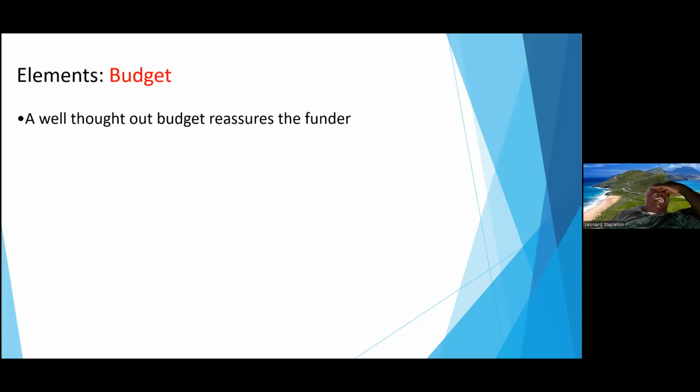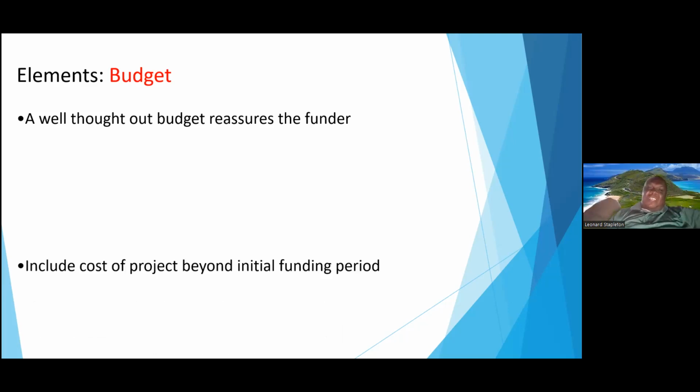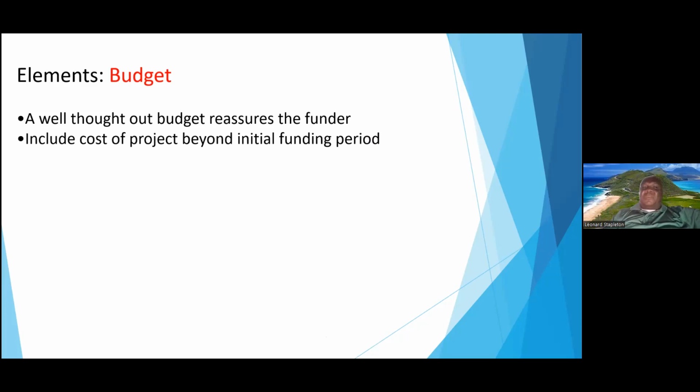You must look at the activities that you're going to do and the resources needed for each activity. Now, the resources would be in terms of the expertise that you have to pay for, and also the material and equipment and so forth that you have to get. Sometimes you actually have to rent premises to carry out some of your activities. All of that should be thought out, and you put those things together and you get costs.